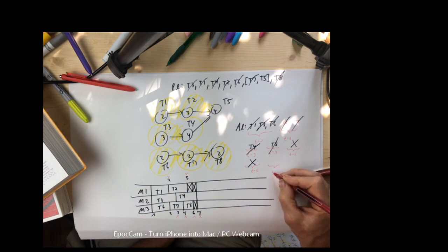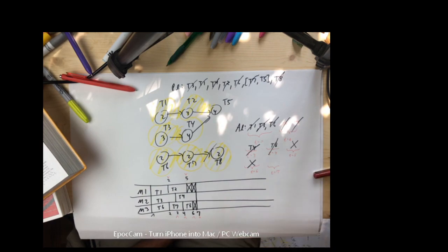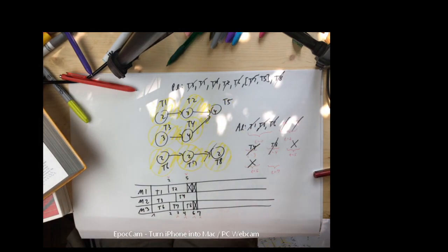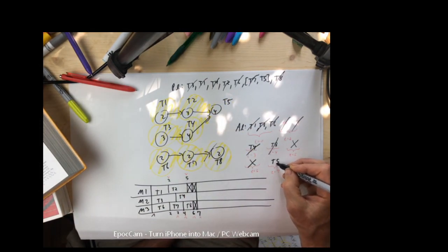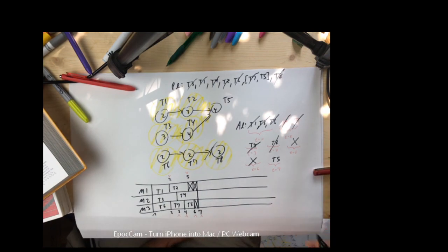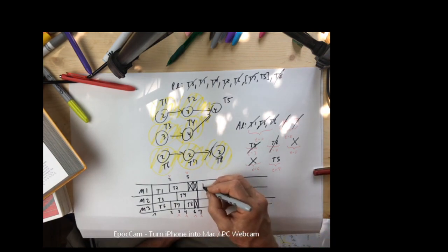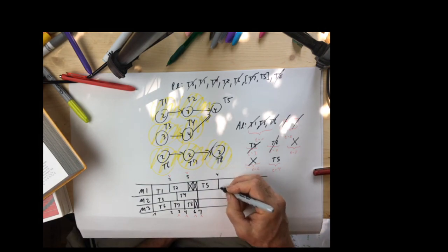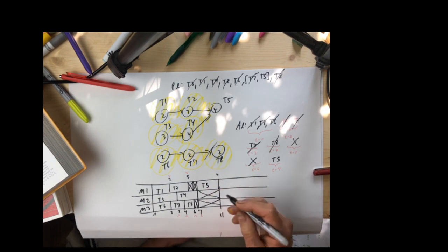So now we're up to time equals 7. What happened at 7? Machine 2 finished T4 and woke the boss up. Boss observes that T5 is now available. 3 machines waiting to work. One job available. He just plops it in there, puts it anywhere he likes. Here's T5. It's going to run for 4. We're out to 11, and lots of downtime.